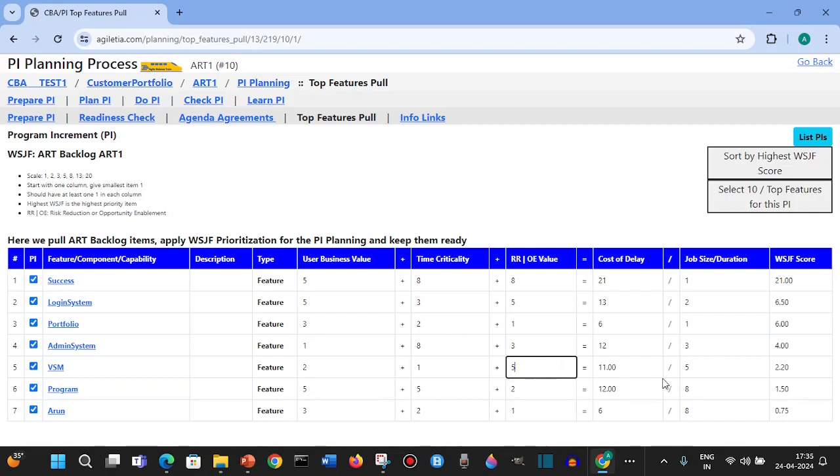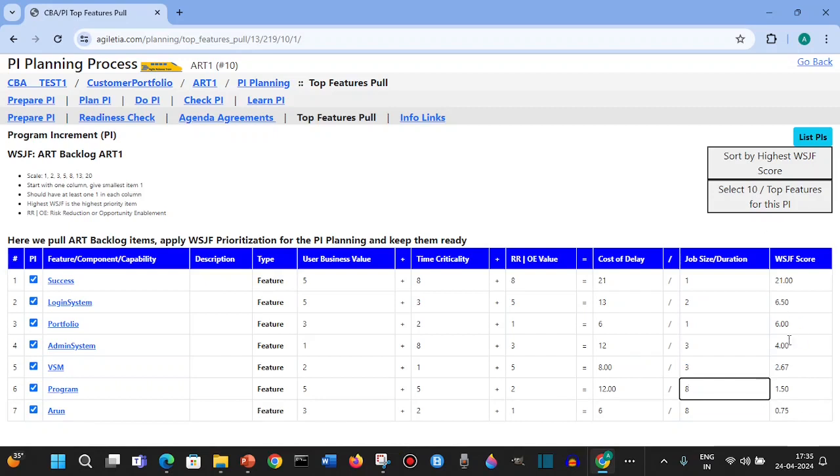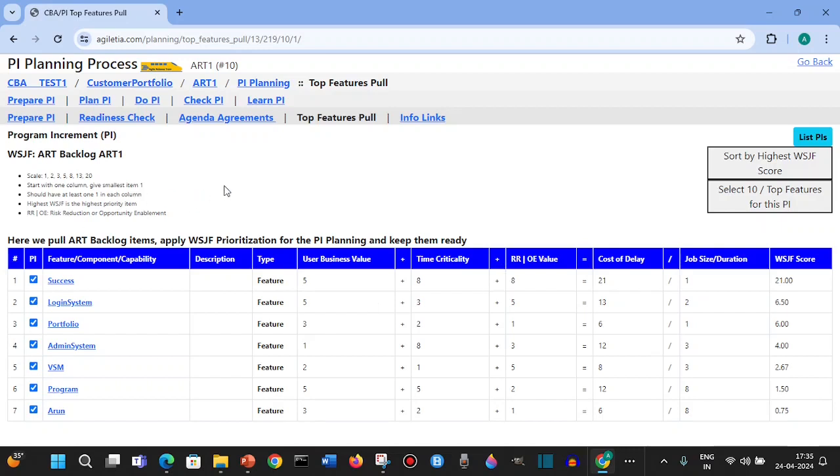This will be like a five, then this will change the COD. When you change the job size or duration, it will actually calculate. Then just for assurance, you can say sort by highest WSJF and then pick up the ten features or components or capabilities. Once you click on this, it will be associated with the current PI.